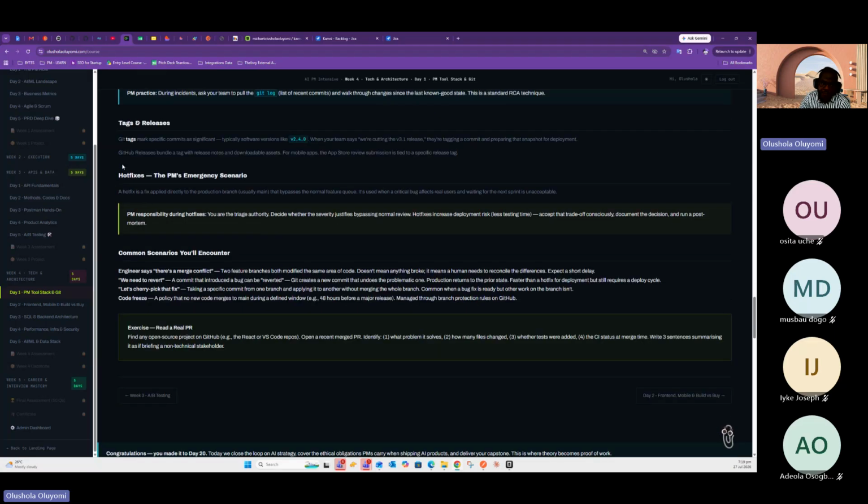And I've explained what hot fixes are to you, right? Hot fixes are basically when something is disturbing Dangote in production and you have to fix it immediately. You don't have to wait for the planned release. Maybe your planned release usually happens on the 30th of every month. You don't have to wait for the 30th of the month to release. You can release it today because it is affecting somebody very important in production, right?